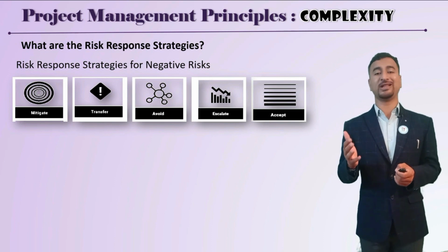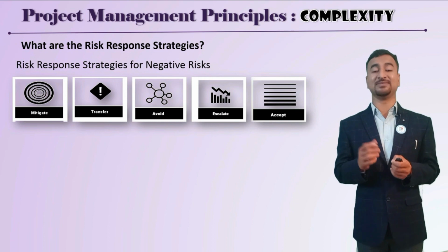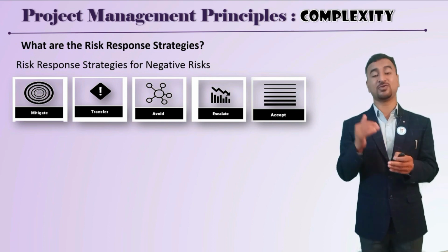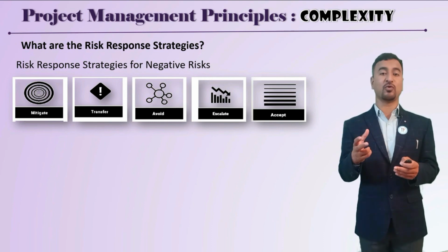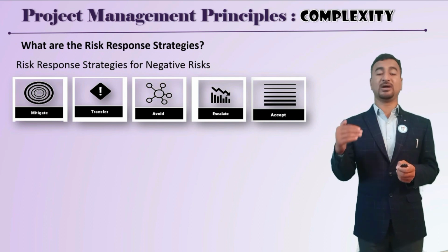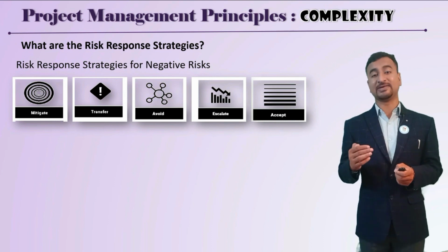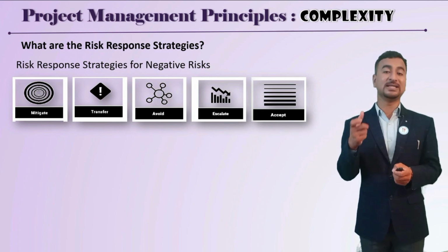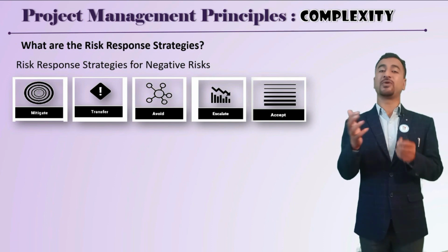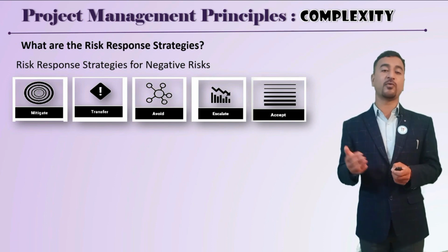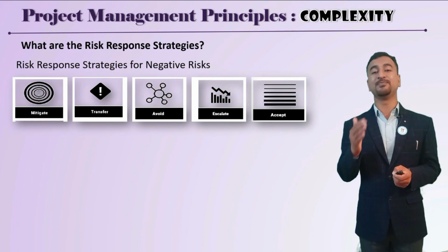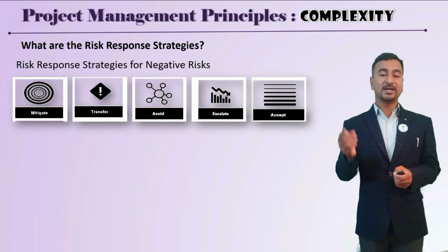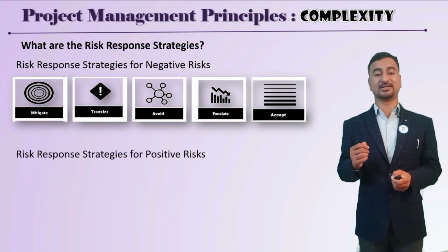You cannot control that. You cannot define a strategy because cost-benefit analysis also plays a pivotal role. In mitigating that risk, the cost of implementing the strategy may be so high that you cannot incorporate it, but simply accept that risk, and you register it in the risk register.